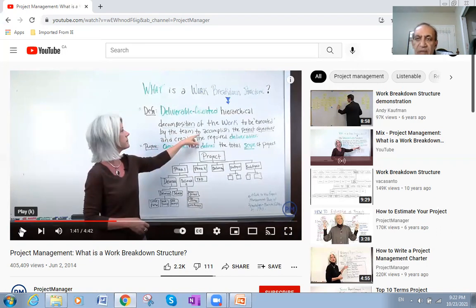Like we said, if we will build this building of 5 stories, then we have to do the ground floor, then the first floor, then the second, then the third, then the fourth, then the fifth. Each one of them includes activities, sub-activities or subtasks, which we will divide into subdivisions, till we reach the limit that it cannot be divided anymore. And we will then allocate or assign these works to a specific person in the organization. After we determine those tasks or subtasks, we divide them.